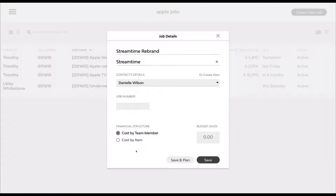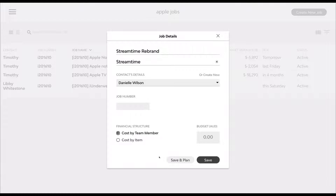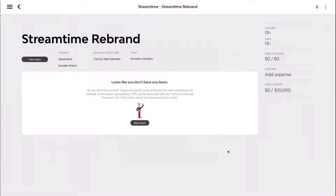It will remember the next number for the next time you create a job. We also have two financial structures: cost by team member and cost by item. One is where fees are charged by the hourly rate per person, and the other is by item — if your main focus is just the item and it doesn't really matter who's working on it. And then there's a budgeted figure — I'll put in $10,000 for this stage. Then just save and plan, and that will take you directly to the job.